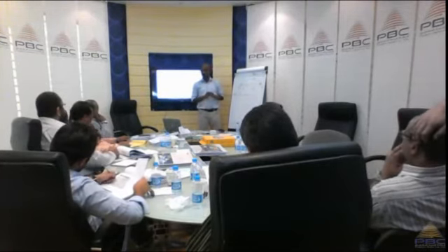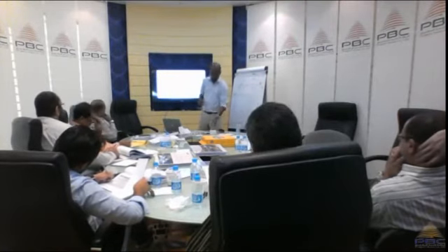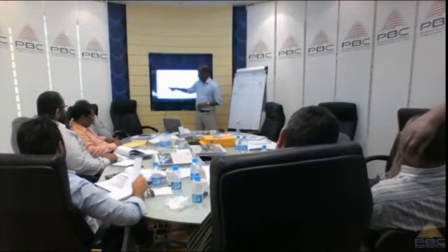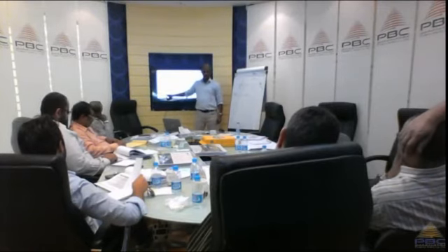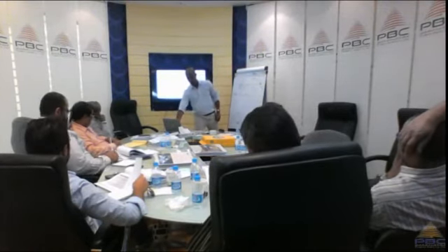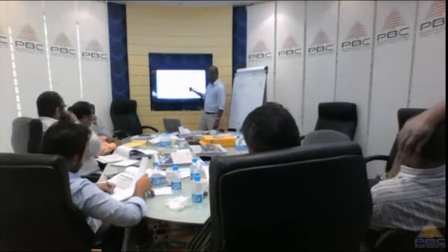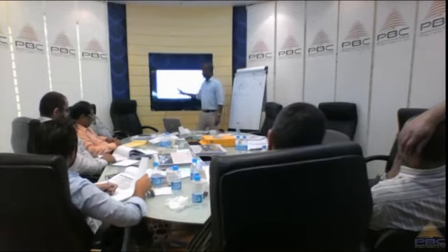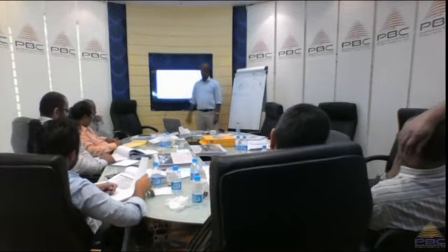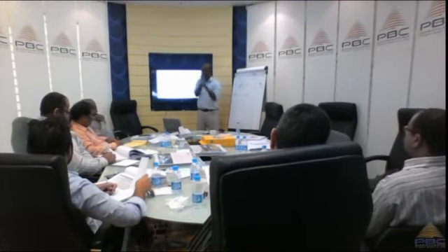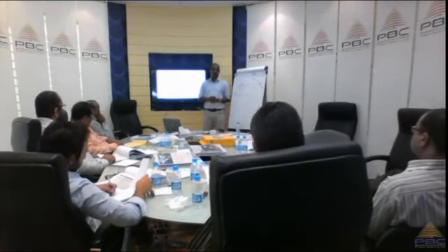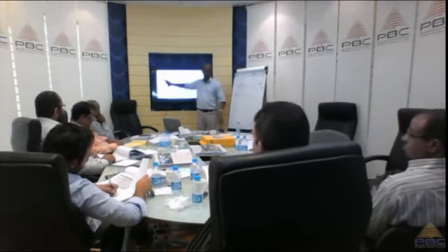If you want to be more accurate, you regulate this value, BAC minus EV, by the cost performance index, because the CPI, remember, is your performance. So you take the CPI and regulate this value by it. Now these values will be very close together, but we use them depending on the situation. In the exam, these are not used. So this is for your general knowledge. You won't get any question in the exam like this.